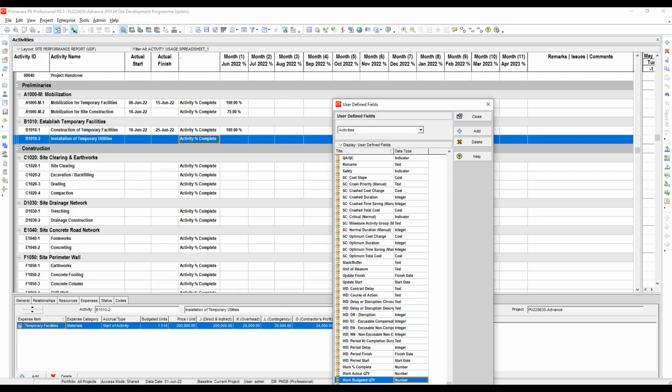For example, if the progress tracker provides actual quantities instead of quantities percent complete, the planner or the scheduler will be obliged to calculate the quantity percent complete as required, for the physical percent complete input for the performance progress update.